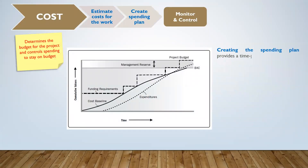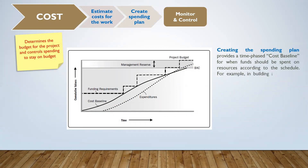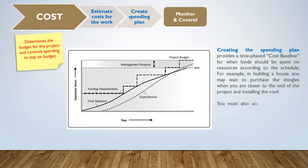Creating the spending plan provides a time-phased cost baseline for when funds should be spent on resources according to the schedule. For example, in building a house, you may wait to purchase the shingles when you are closer to the end of the project and installing the roof.